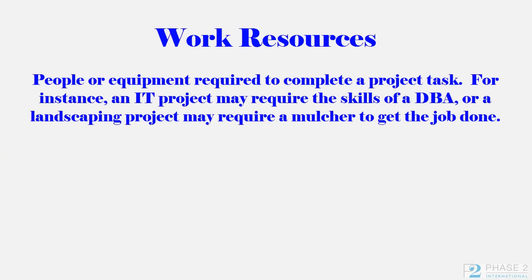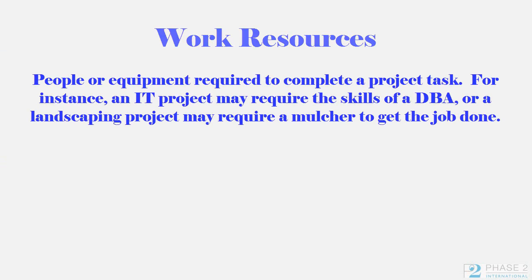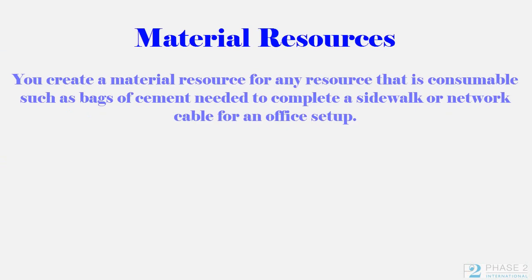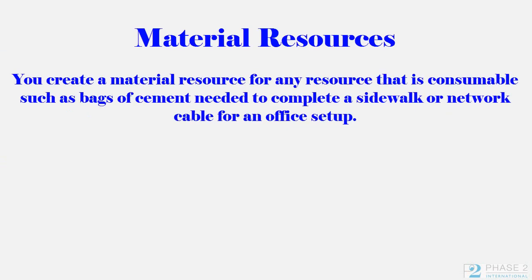Work Resources are people or equipment required to complete a project task. For instance, an IT project may require the skills of a DBA, or a landscaping project may require a mulcher to get the job done. You create material resources for any resource that is consumable, such as bags of cement needed to complete a sidewalk, or network cable for an office setup.